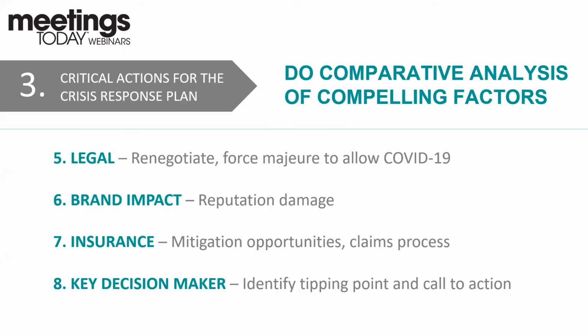Okay. I think I've just discussed legal is very important for every single contract you have, starting with the hotel, starting with the highest cost, starting with the vendors, obviously where your biggest financial exposure is. Unfortunately, a lot of folks I talk to, they don't even have a force majeure clause in most of their vendor contracts. So you really would be looking at the statutory force majeure provisions, depending on what state you're in, depending on what country you're in. Especially in European countries like Italy and Britain, they have their own law that is used to interpret the contracts. But this is a huge part of what you need to be doing in your duty to research.